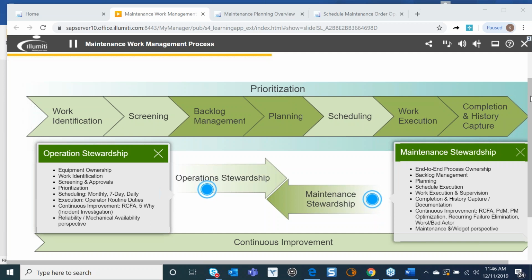Yes. So you do have the ability to do that, and a very nice feature within our KPIs is there is a tile that in real time will actually tell us what percentage of planned versus unplanned work that we are doing, so that we can work on that and get us to a great place. Industry standard says you want to try to be 90% planned and 10% unplanned, because you're always going to have those little uh-ohs. So we want to try to strive to get to that. So within the individual tiles, there is a planned versus unplanned tile that in real time you have that information at your fingertips at all times.